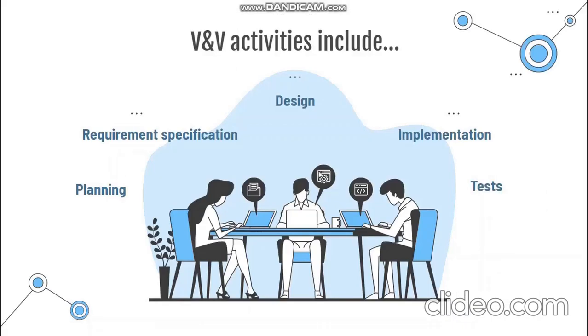So as a summary, as my friend Arife also talked about it, and my other friend will also talk about it in more detail, I'd just like to give a brief summary, like a chapter comparison of 2 verification and validation plans, right? So we have 2 plans: the standard plan and the comprehensive plan. So if we apply a given verification validation plan, we can compare alternative programs by supplying the expected percentage of errors to be removed in each screening stage for each activity, right? So the software quality assurance model deals with 2 aspects, which are the total effectiveness of the defect removal plan and the total cost of the defect removal plan.